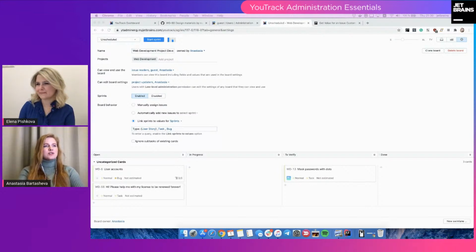And as for computing the task progress in the Burndown, it considers either issue count, I mean resolved issues, or estimation values. So when you log some spent time, the percentage changes, and the Burndown changes as well.